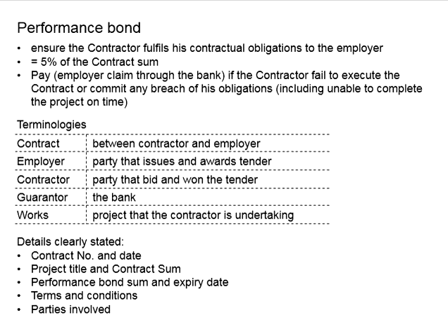As a result, the employer suffered loss, and it is fully due to the responsibility of the contractor. The contractor will have to bear the consequences. As a result, the employer can claim the losses and expenses from the contractor. The problem now is, what if the contractor does not wish to pay the employer? There is nothing that the employer can hold over the contractor. This is where the performance bond comes in.